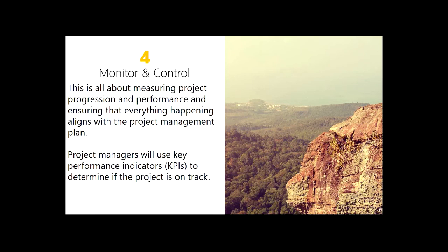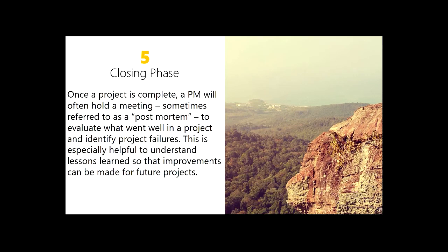Fourth phase, monitor and control. This is about measuring project progress, and we'll use KPIs, or key performance indicators, to determine if the project is on track. And then the closing phase. At the end of a project, a PM, project manager, will often hold a meeting, sometimes referred to as a post-mortem, to take notes and to bring some learning from the entire project itself and what could be done better in the future.